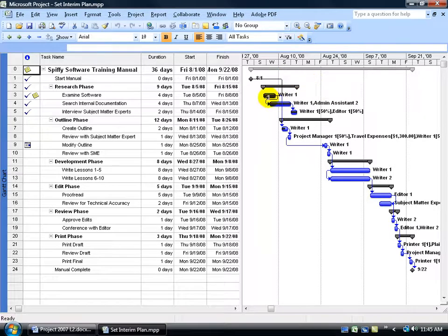See if this makes sense. If I just have my original baseline, with no interim plans to divide up or section out the start and finish dates to really analyze the differences between certain points in time, and I just have my project end date, let's say my project baseline end date was supposed to finish September the 22nd, and let's say it got delayed 2 or 3 months. Well, all I've got is the end date and then the original baseline date, and I'd have to go back through and figure out at what point in time we really experienced the delay,